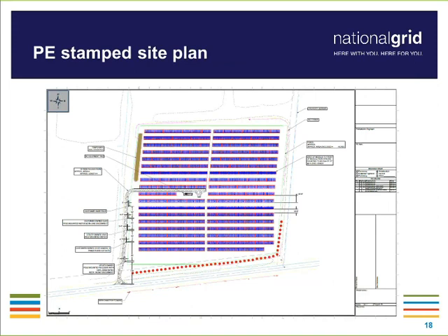Absolutely. So with a site plan, as you've seen some of the examples before, and we understand as well, they can be an iterative process. But as we progress through and discuss the changes or modifications needed to satisfy the project, ultimately we need to arrive at what would be considered, for a project that is over 600 volts, a PE stamped site plan.